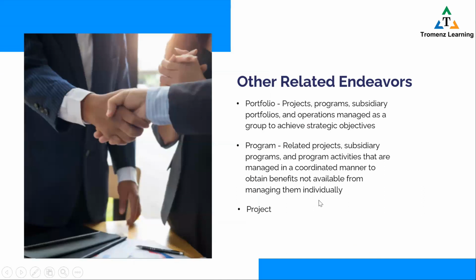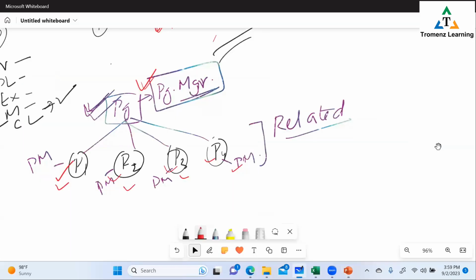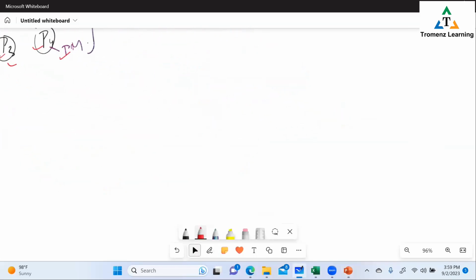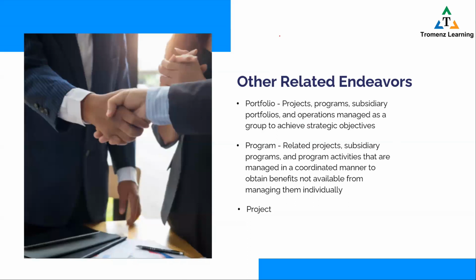Well, there's a saying. I'll give you the saying. We say that project management is about doing the projects right, while portfolio management is about doing the right projects. So what is portfolio management here? It's about doing the right projects. So what I mean through this is project selection. And this happens to be the most important job of a portfolio manager. That is to decide what projects to include in my portfolio, which ones to timely exclude from the portfolio.